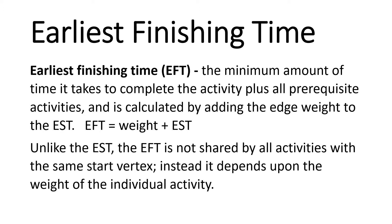Earliest Finishing Time, otherwise known as EFT. The earliest finishing time is the minimum amount of time it takes to complete the activity plus all prerequisite activities. It is calculated by adding the edge weight to the earliest starting time: EFT = weight of the edge + earliest starting time. Unlike the earliest starting time, the earliest finishing time is not shared by all activities with the same start vertex — instead it depends upon the weight of the individual activity.